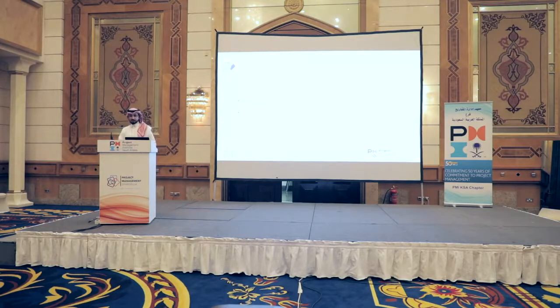And second is the utilization of BIM by the construction contractor, as most contractors find it challenging to utilize BIM efficiently with regards to the following points. First is the schedule integration to the model that, if used correctly, will support to better manage the work activities in terms of sequencing and duration, which will directly impact their cost.